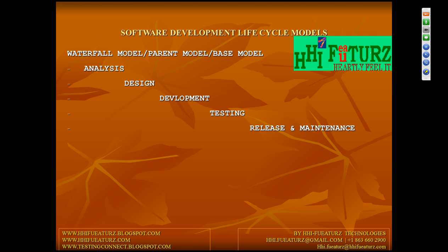As you may be aware, in the waterfall model, once the analysis phase finishes completely, only then do you go for design. That means business analysts gather all the requirements from the client and prepare the BRS and SRS.